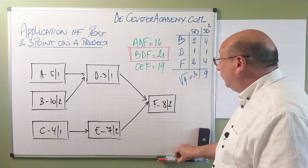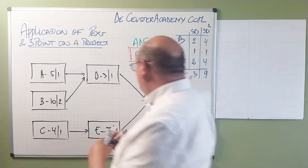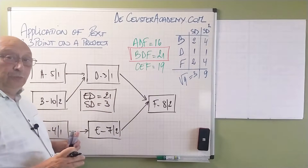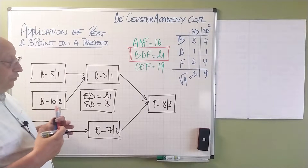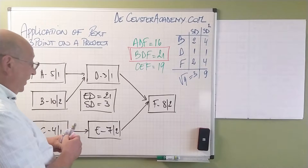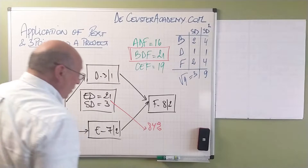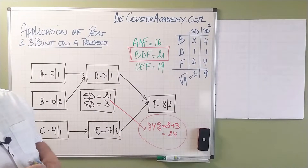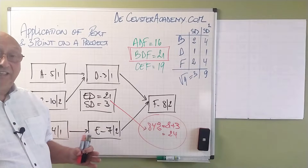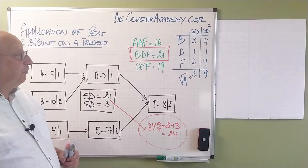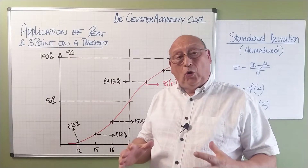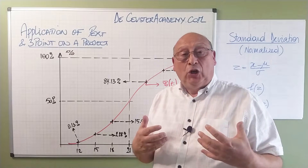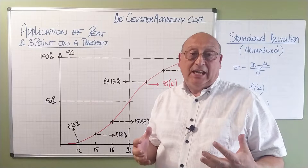For our project, the expected duration is equal to 21 and the standard deviation is 3. Based on that, we can calculate the relationship between duration and probability. When we look at 84% probability, we know that this equals 21 plus 3, which is 24. Basically, it means we have an 84% probability that our project will be finished in less than 24 periods. Once we have found the duration of the project and the standard deviation, we can put that information in a graph.